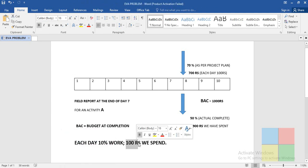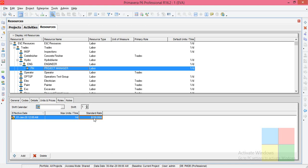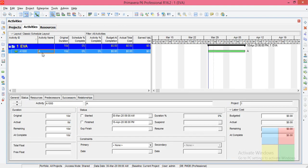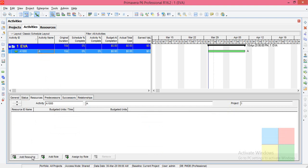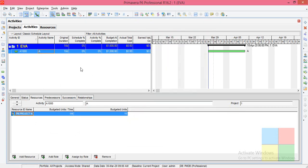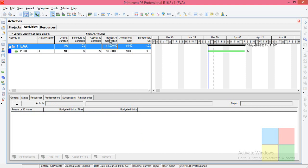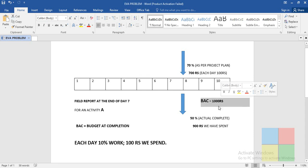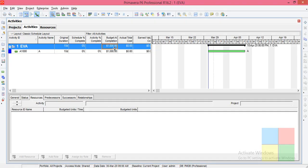Now come to Units and Prices and change the standard rate to 100 per day. Per day we are spending 100 rupees — in the software it shows dollars, just imagine it as rupees. So 100 per day. Come to the Activities window and assign the resource to Activity A — Project Manager. For Activity A I have assigned Project Manager: 1 unit per day for 10 days = 10 units total.